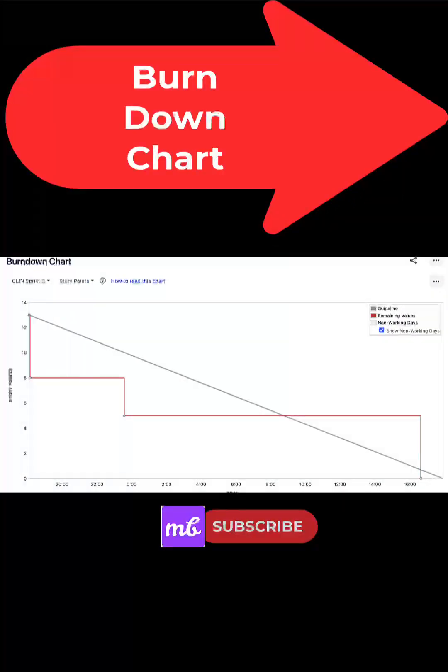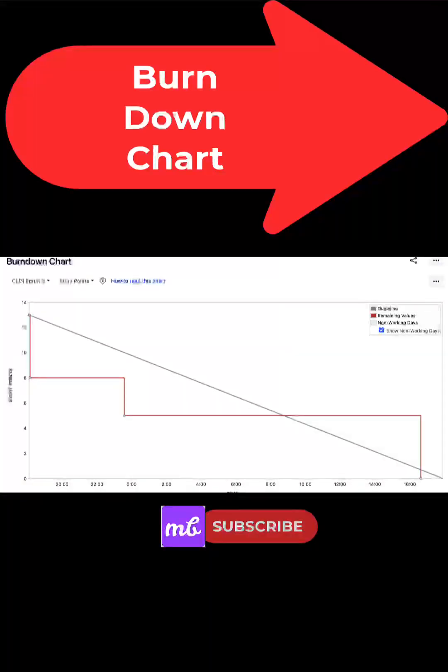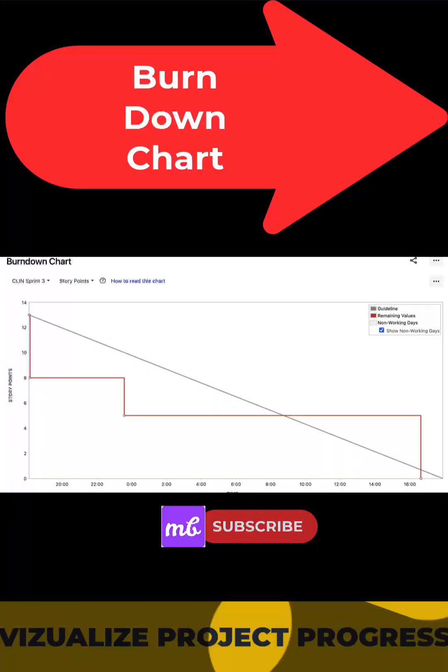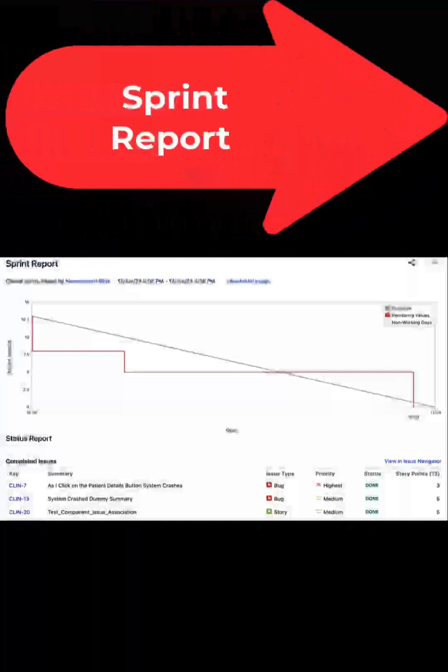Burndown charts. Burndown chart tracks the progress of the work. It shows the amount of work remaining versus the time available. Use this report to visualize project's progress and make changes if required. Sprint reports.